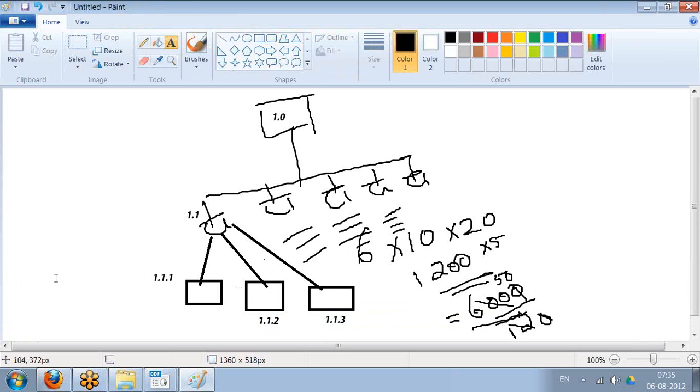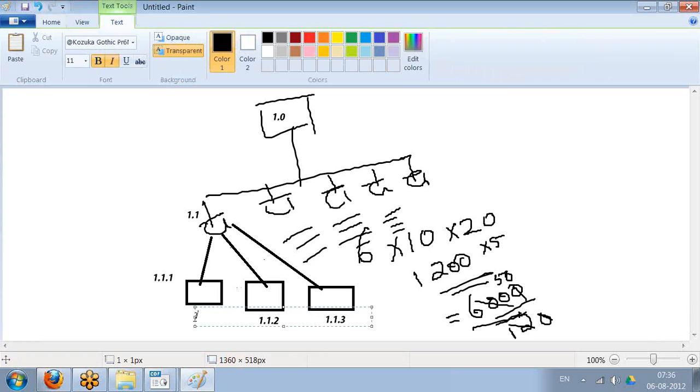So this numbering scheme will help me to tell which work package, the hierarchy actually. By looking at this, I know that the parent of this is 1.1. By looking at this, I know that the parent of this is 1.0. So a kind of numbering scheme. We call it a code of account identifier. That means if a budget for this is, let's say, 1.1.1 is $500.